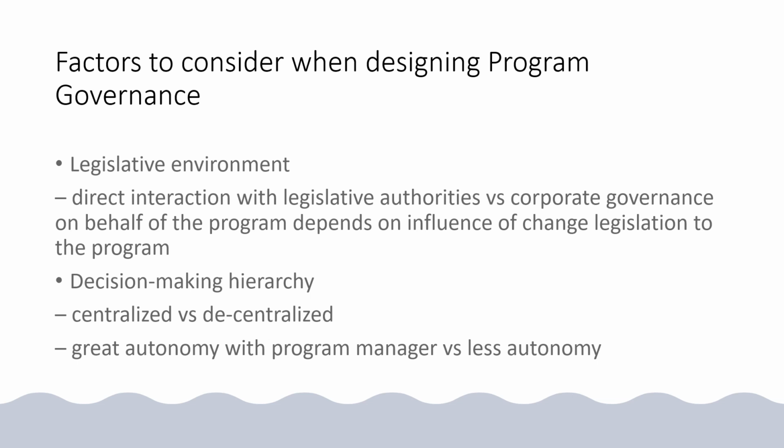If there is a high level of interaction and a high level of changes required, then the program manager or program management team can directly interact with the legislative authorities. If it is very low, corporate governance can interact with them on behalf of the program management team. It depends on the influence of change in legislation on the program. Accordingly, you can have either direct interaction from the program management team, or you can have corporate governance interact with them.